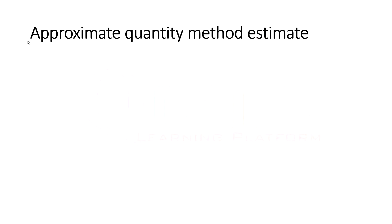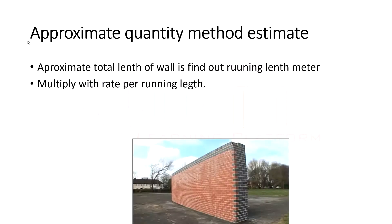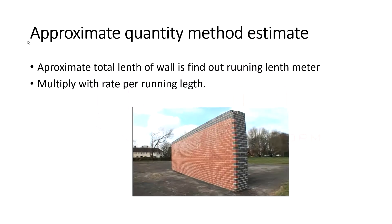In the approximate quantity method, the approximate total length of the wall is found in running meters, and the total length is multiplied by the rate per running meter of wall, giving a fairly accurate cost. For this method, a plan or line plan of the structure must be available. The running length of each wall is calculated and all walls of the building are included.